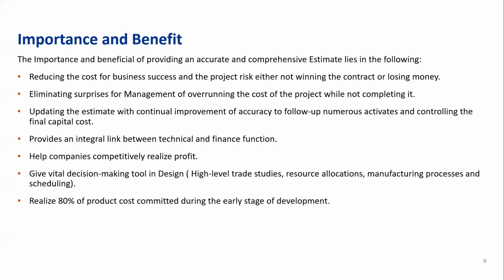The importance of the cost estimate application: we can say it reduces the project risk, either of not winning the contract or losing money, or reduces or eliminates the surprises for management, for better understanding of the project and to make better decisions. Also, update the estimate with continual improvement of accuracy to provide a follow-up for all those activities involved in controlling the final capital cost, such as tracking the bulk account, progressing quotations, equipment delivery dates, and so on.